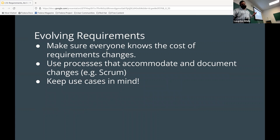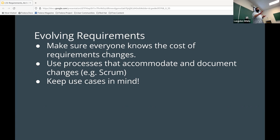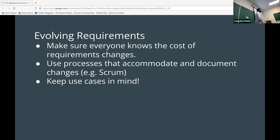A common method in Scrum is to just have a 'done' column, but that's usually a bad idea. Do it done by sprint instead. What you want is to be able to go back and look at what you accomplished per sprint, especially because of evolving requirements. That user story that got canned — you can go back and look at the fact that it was three sprints of one and a half people's work. It was real work that was done; it just didn't meet the goals of the overall project.